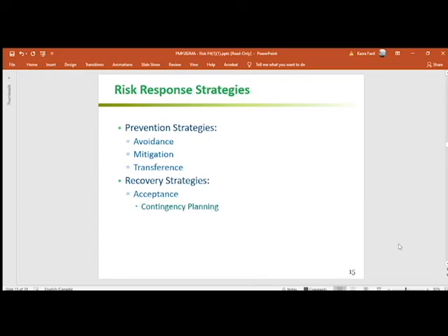So if I avoid the risk A in my project, I may be in a situation of introducing a new risk. While mitigating a risk, I will not be removing the risk. The risk will stay with my project. And that existing risk, now lower in probability or impact, is called a residual risk. So if anybody asks, what is a residual risk? Residual risk is a mitigated risk, the original risk with a lower probability or impact.